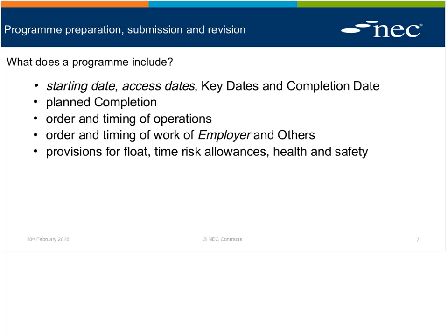If you look at the fourth bullet point there, order and timing of the work of the employer and others, without the acceptance of the employer of the program, and 14.1 is very important here because we're not changing the contractor's obligations or liabilities. But if there are things shown on the program which are for the employer to deliver, or others whom they are responsible for, then it's important that those things are accepted, thus binding them into those obligations. A number of provisions of the contract rely upon the term accepted program to operate the contract properly and effectively. Absolutely.